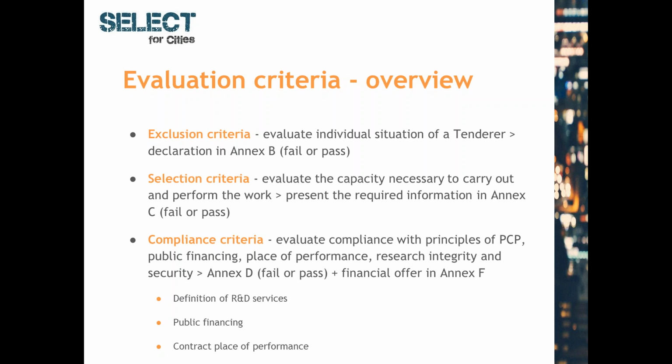The purpose of the selection criteria is to determine whether a tenderer has the necessary financial, economic, and technical and professional capacity to carry out and perform the work. The tenderer needs to showcase this ability in order to successfully complete a project of this nature and of this size. Any tender that cannot meet the requirements in this section will also not be selected.